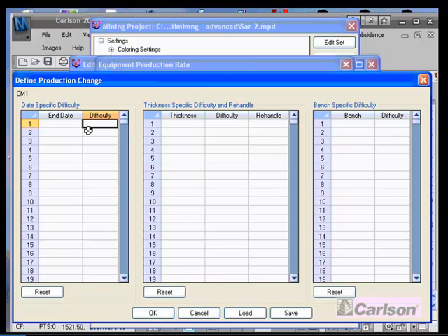The difficulty factors and the things that throttle productivity for coal mines typically fall into two camps. One is date related, time related. The other is positionally related, such as areas where there's difficult mining conditions, bad roof, water, whatever. Those can be identified and gridded, and taken care of that way.